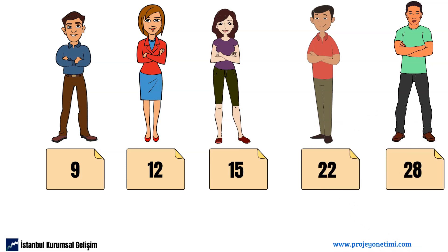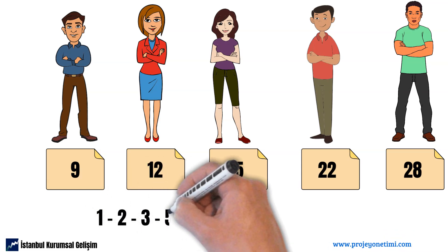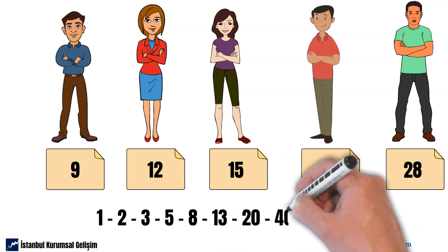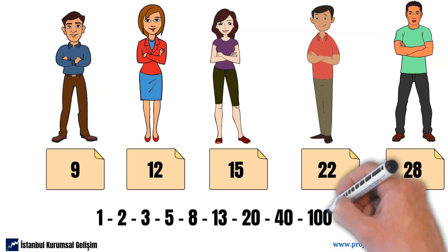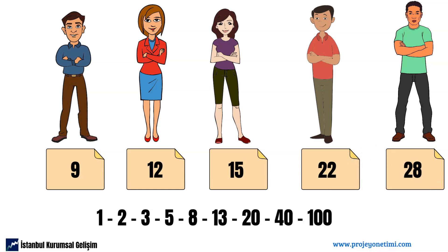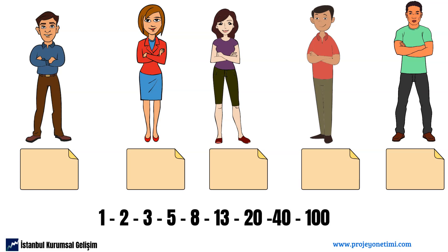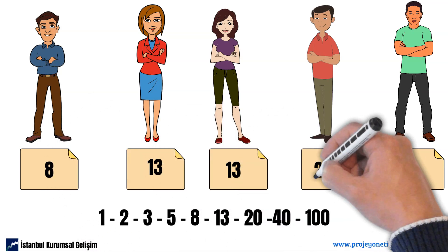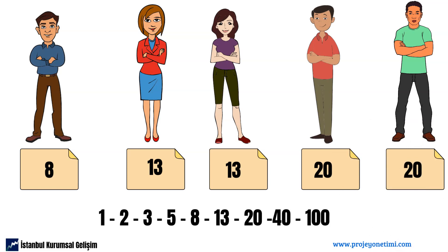The Scrum Master asks team members to revise these numbers in accordance with the planning poker number sequence: 1, 2, 3, 5, 8, 13, 20, 40, 100. The aim here is to categorize and place the estimates that are close to each other on a similar scale. Thus, the estimates given are revised to 8, 13, 13, 20, and 20.